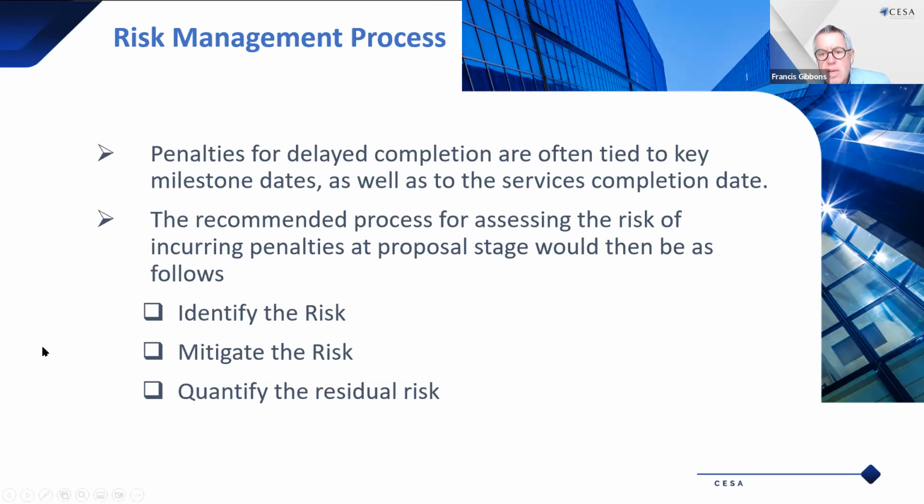Then you need to allocate the resources to each of the tasks and the effort required from each team member or resource to complete the task. Check the period available to complete the deliverable is sufficient considering the hours required and that some float is available. Again, reinforcing what Dave was saying, you need to build float into these things. One is always keen to offer the client the shortest possible period for completion, thinking that you're going to make the most money.